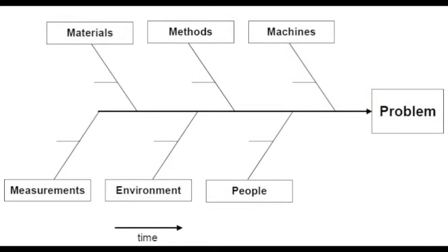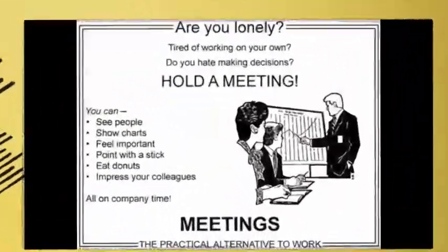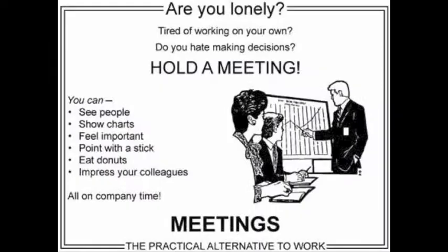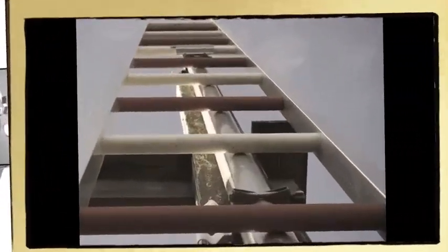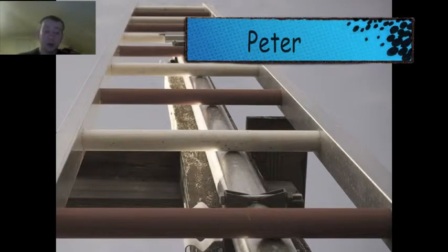Three common outcomes that occur when using the fishbone diagram include the team identifying a category full of potential causes, a systemic root cause being identified and eliminated, and no exact cause or category being identified. If no cause is found, the team can use other methods, such as Pareto chart and the interrelationship diagram, to further their data collection. Another behavior/activity that leads teams to success is avoiding assumptions.